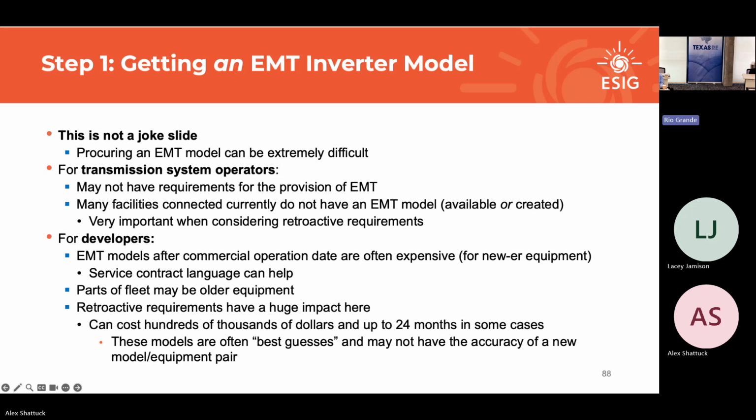So for the developer side, getting your EMT model during the interconnection process is one of the biggest pieces of advice I can give you, having worked at a manufacturer where you'd be really surprised what you'll get for free if you say, I'm not buying your turbines unless you give me it. It's really great. Don't tell them I said that. But it's a really good way to get it, right?